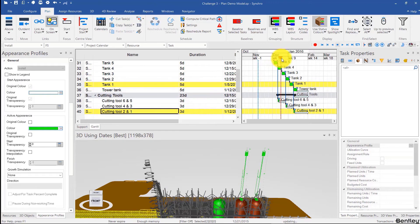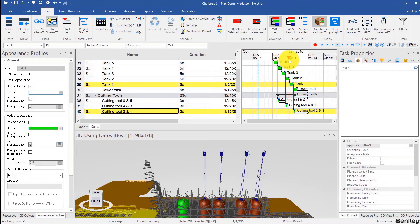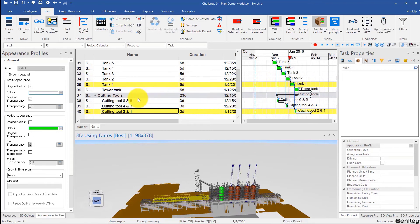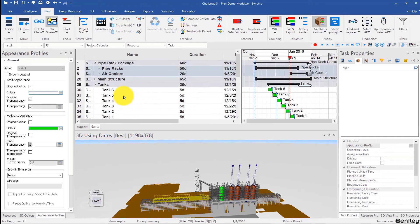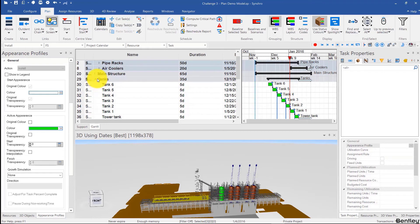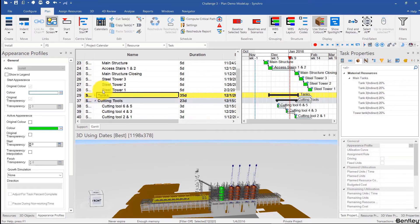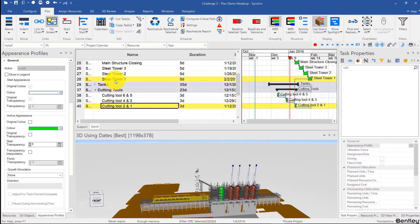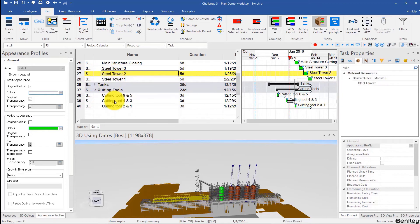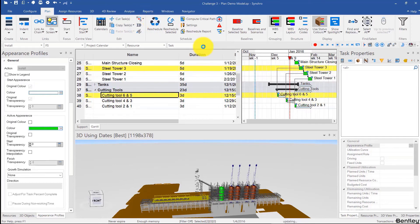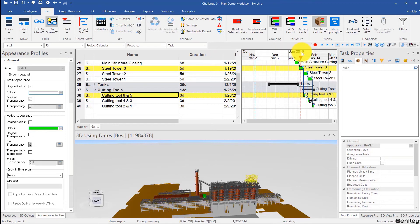Here we can see the cutting tool tasks. Now that I look at the schedule, they have to come after the towers too. So I can keep the link and add the link for the towers as well. Steel tower one has to come before this — Ctrl+L. Then for two, has to come before these — Ctrl+L. Three has to come before these — Ctrl+L. Then reschedule. So steel tower three, and then we have the cutting tools. That looks perfect.